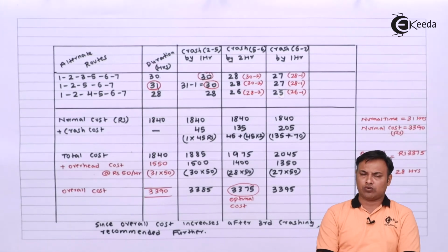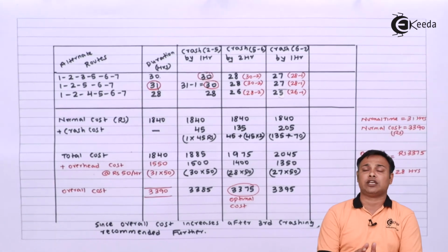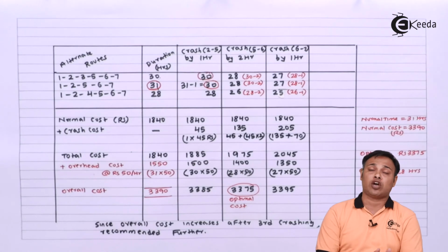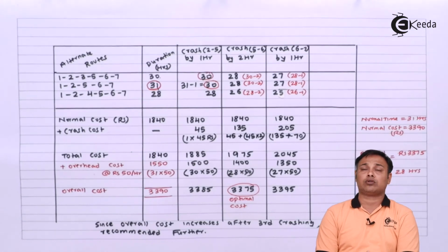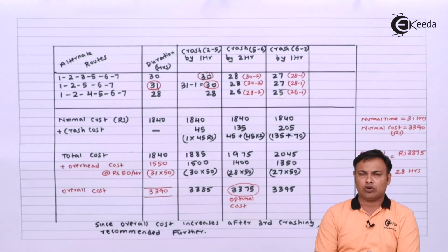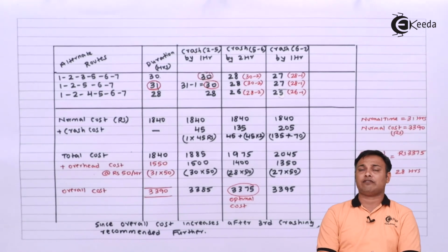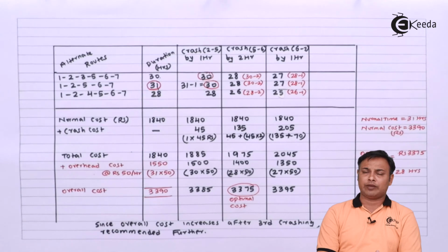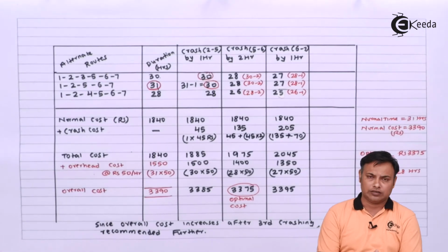अगर एक critical path है तो उसको ही crash करना है. Crashing के time पे like a rational individual you have to always crash the activity with the lowest possible slope. Secondly, while doing the crashing, if the indirect cost or the overhead cost is involved, then you must always stop your crashing at the point when the total cost starts increasing. I hope you got all the points clear. This will take some time to get stable in your mind because crashing is a very logical concept. Every sum may be unique in its own terms, and drawing the network diagram is the ultimate challenge or the first and foremost step without which crashing can't be learned. I hope you got the points.